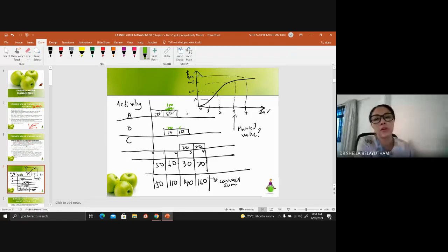This is where we are not trying to overrule, but we might create another sheet that highlights the actual. Your actual is similar, your network doesn't change, except that this value would change. So when you combine this value at week 3, you will see the difference. Whatever is in black is the original value you got from the contract. This is the graph that you're supposed to adhere to. But on the site, this is where you have the changes.